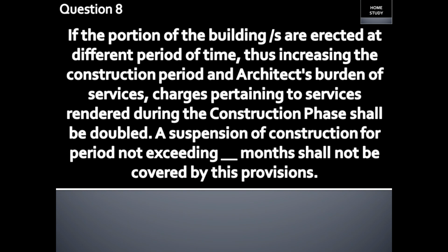Question number 8. If the portion of the building or buildings are erected at different period of time, thus increasing the construction period and architect's burden of services, charges pertaining to services rendered during the construction phase shall be doubled. A suspension of construction for period not exceeding blank months shall not be covered by this provisions. Answer. 6 months.